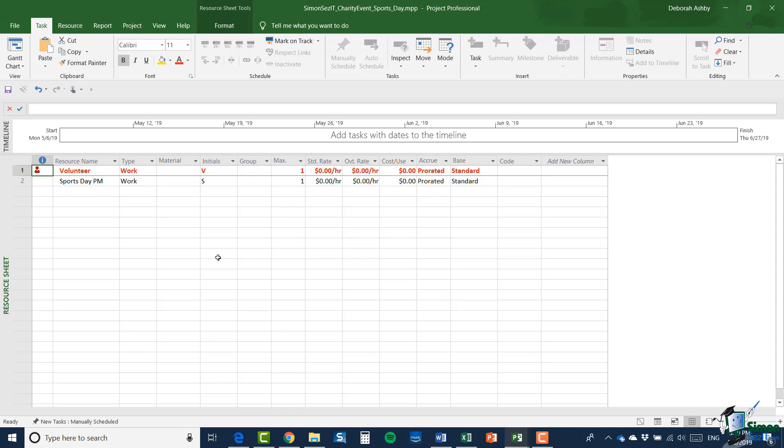But in addition, if I look at the resource sheet for my newly created project, you may be surprised to see that there are only two resources on it. We have volunteer and note that the max number is one and we have sports day PM. So our new project has a sort of resource sheet created for it, but it doesn't get the same resource sheet as the total project that we started with. And what happens when you do what we've done is that Project 2019 creates a resource sheet based on the resources that are already specified in the copied and pasted tasks.